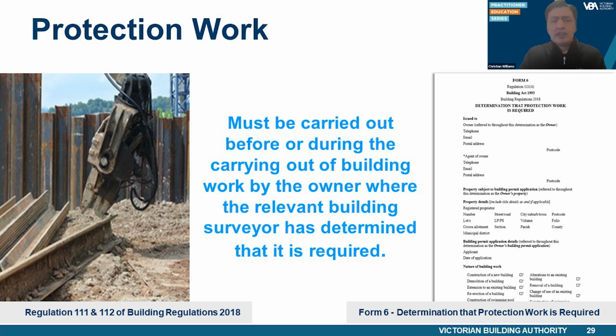Under Regulation 111, the protection work must be carried out before or during the carrying out of building work by the owner, where the RBS has determined that it's required. Some people are of the opinion that where there's work being carried out on or near the boundary of an adjoining property, or where the builder needs to access the adjoining site to carry out some of the work, that this automatically means that protection work is required, where this is not actually the case.